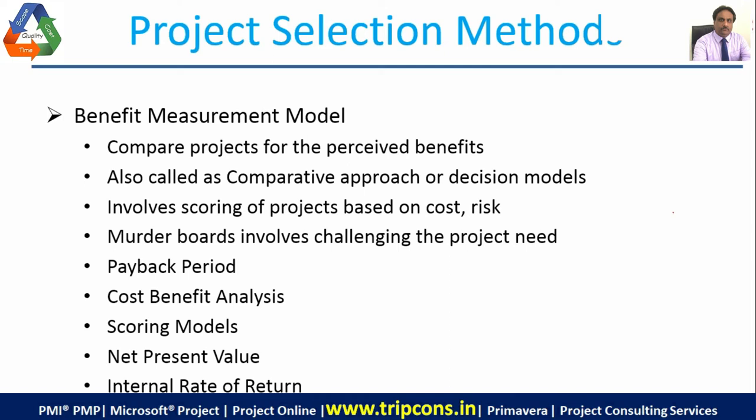Then cost benefit analysis basically tells you how much money you would invest and what is the benefit that you would have. Like, I would do a cost benefit analysis on the city transport. So I have the options. One option is that I go for the metro. One option is that I go for a tram system. One option is that I make lots of flyovers. Another option is some sort of monorail system. So there is a cost and there is a benefit. Then I look at the one where the cost is the least and the benefit is the most. So I would do cost benefit analysis.